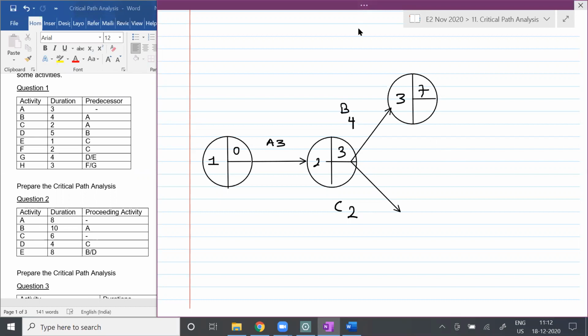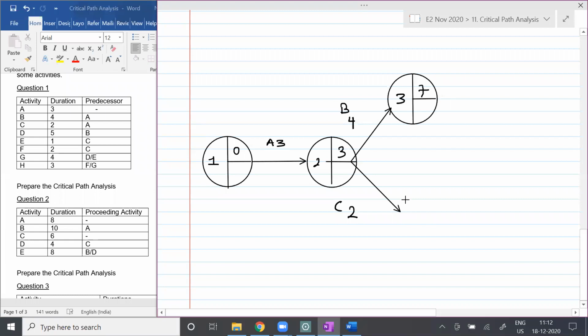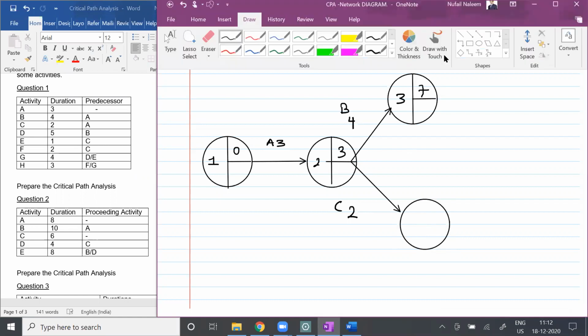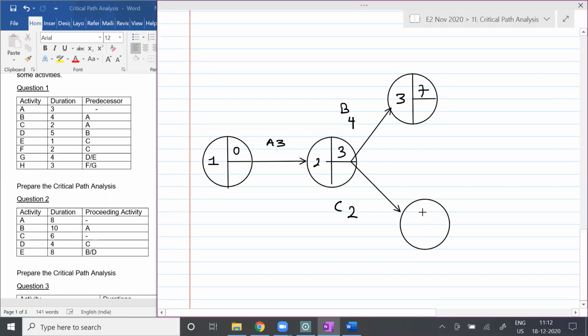Okay. And similarly, can I come to the next one? C has started with a node and it should also end with a node. So can we start doing the appraisal? If you want to start C, A should finish. A has started and finished, so it will take 3 days. And 3 plus 2 is how much? 5. Any questions with that, students?